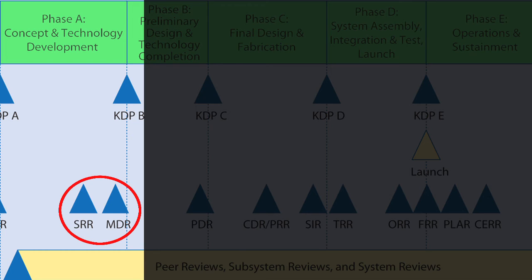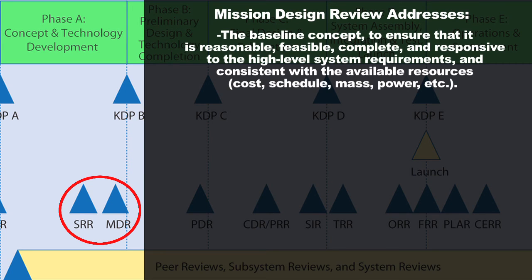The second technical review during Phase A is the Mission Design Review, which comes after the System Requirements Review in the lifecycle. The review team will assess your baseline concept — your current design, set of requirements, and everything defining the system at this early stage — to ensure it's reasonable, feasible, complete, responsive to the high-level requirements, and consistent with available resources, including technical resources like mass and power, and programmatic resources like cost and schedule.